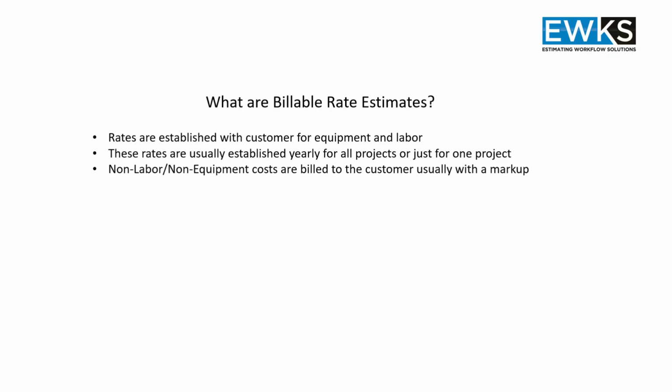Non-labor, non-equipment costs are billed to the customer usually with some kind of set markup. So this would be for materials that you have to buy, and then there's an agreement, maybe 5% for marking up materials or subs.